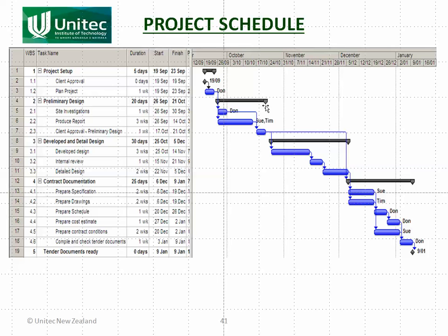You can see these black lines here show the extent of each of these items. Each one of these third level tasks, or activities, all combined together to form this one summary task. In the following slide cast, we're going to look at how we use something like this to manage the project when it's actually being executed. This is the conclusion of our planning process. Now we need to execute it, and we use this to monitor whether we're on time or not, and that's what we'll look at in the next slide cast.